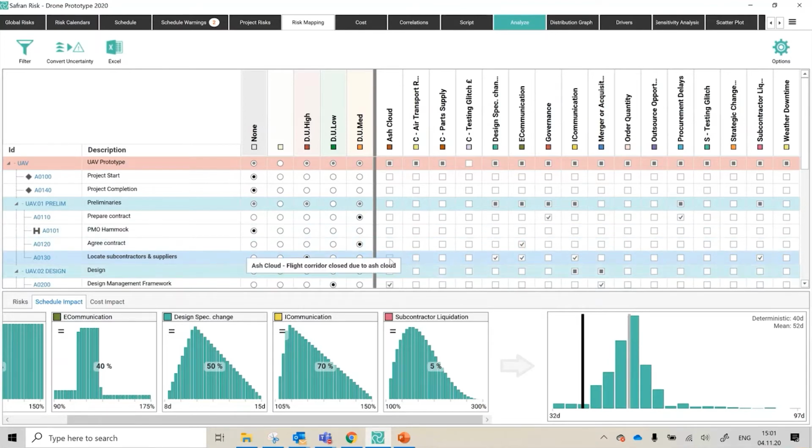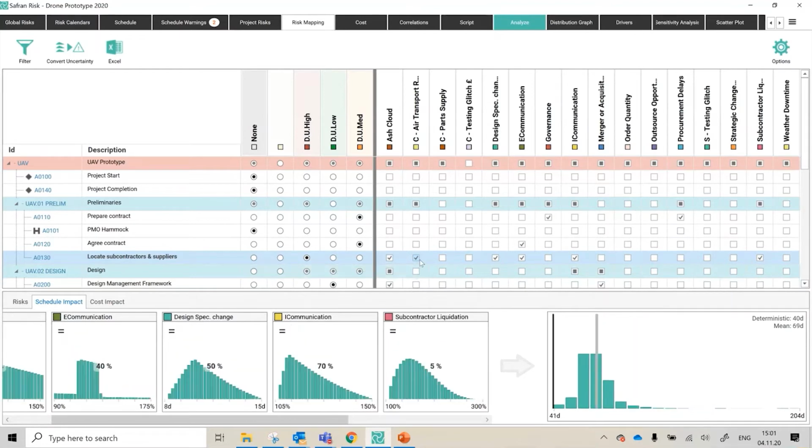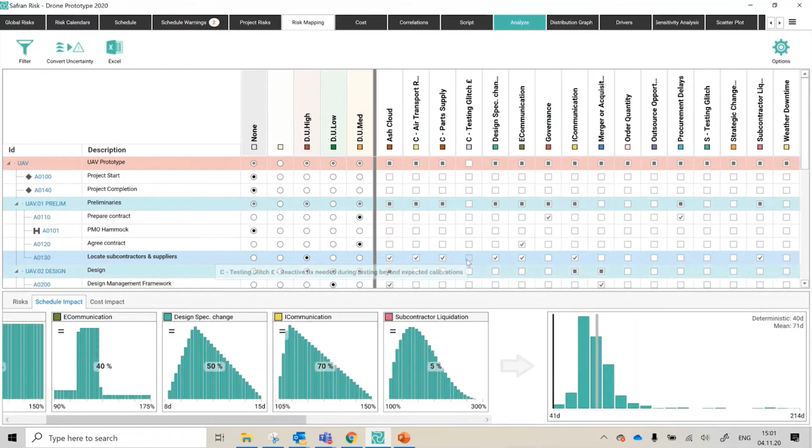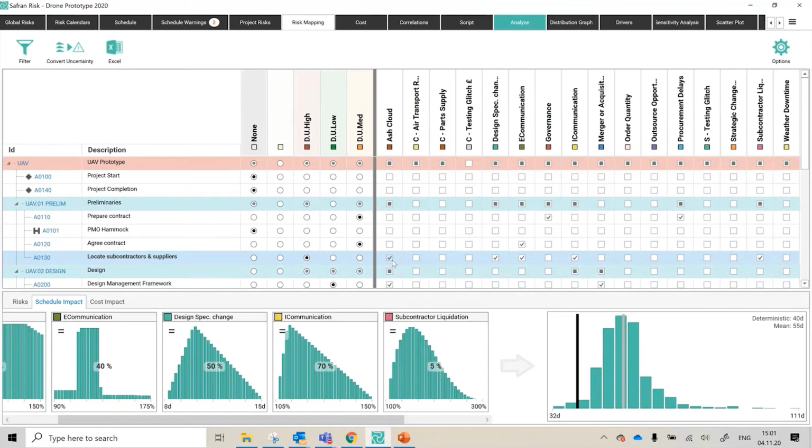Here's the power: as I start adding new risks, you can see in real time that it reruns 1000 iterations instantly. And then you can see that that's changed the shape. Well, maybe not so much the shape, but it's extended the worst case, and the minimum, the best kind of outcome, has also been truncated somewhat. So you get that real sense with your team of how the way we are building the model is really having an effect, and you get that kind of instantaneous feedback.